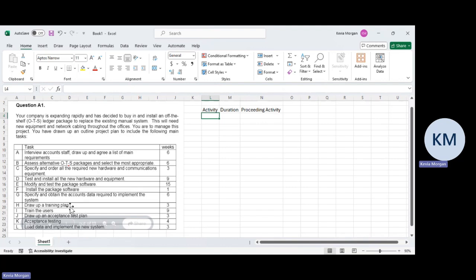Right? You have specifics that you need to complete. Put them in some sort of order that makes logical sense. Either you put it in order of what needs to be done first, going on and so forth, and you know how much inside activities you need to have, or you can put it in order of where the resources are. Who is available to do what.